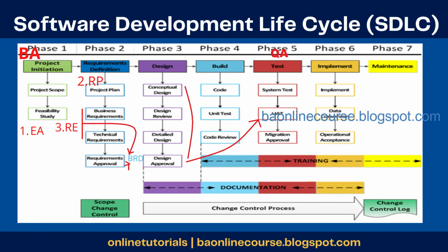If there are no more defects identified, then the system code, the application, is given to the operations team. The operations team would install it into the final production environment, as we call it, and do any data migration if it has to be done. If it is migration from an older system, they will move all the customer order information maybe. Or if it's a brand new system, they will only create the new users.